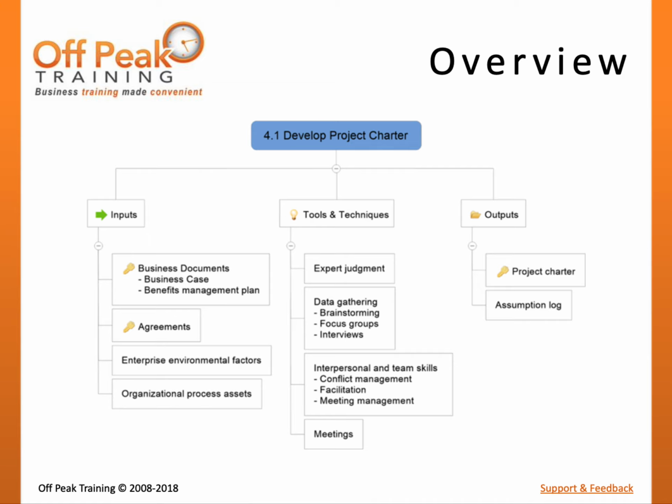Develop Project Charter is a process for the project sponsor or champion to document the formal authorization of a project, name and authorize the project manager, and provide high-level descriptions of the project needs, initial requirements, and expected outcomes. The key output of the process is a project charter, which will likely be a fairly brief document. Since the project charter is a relatively simple document, it is important to understand its purpose and how it differs from the many other project documents.